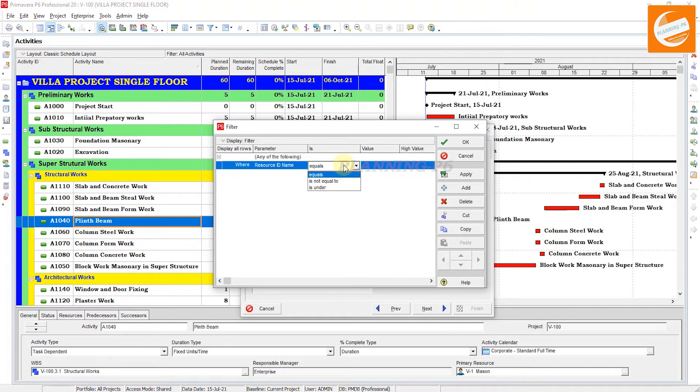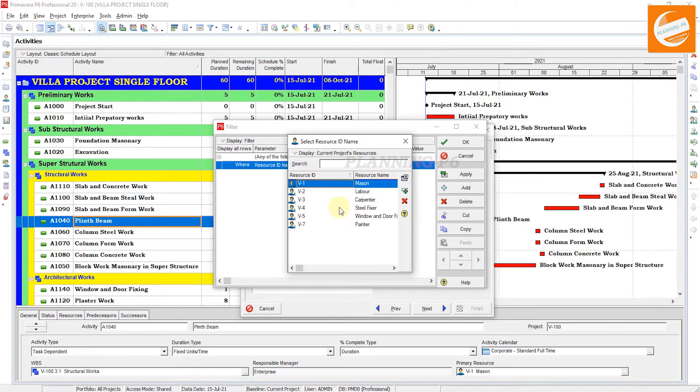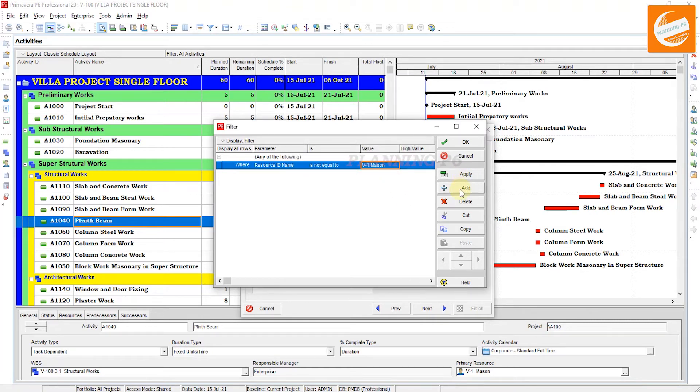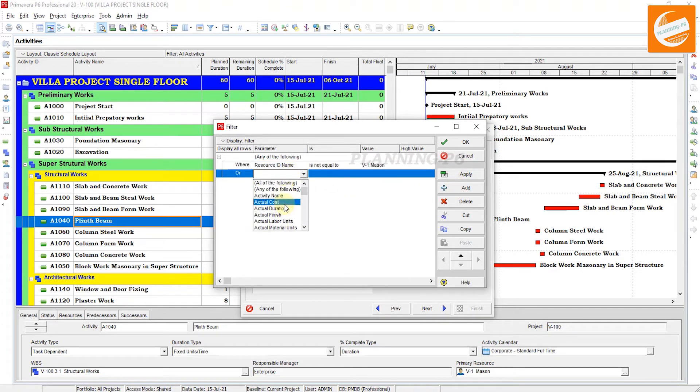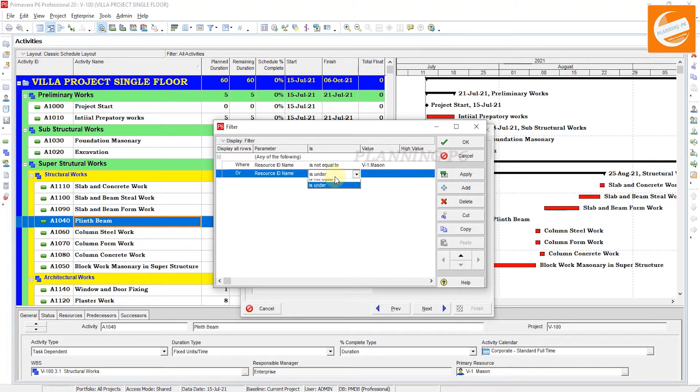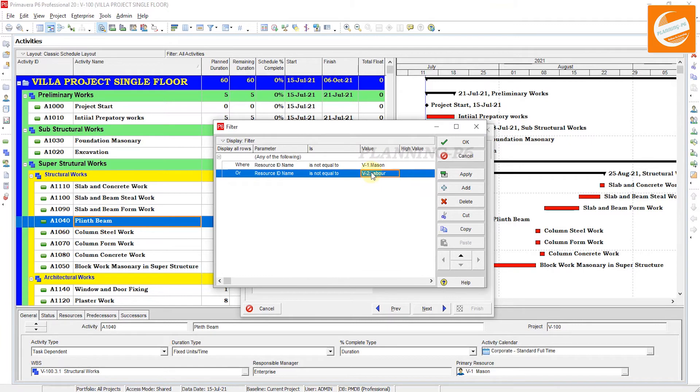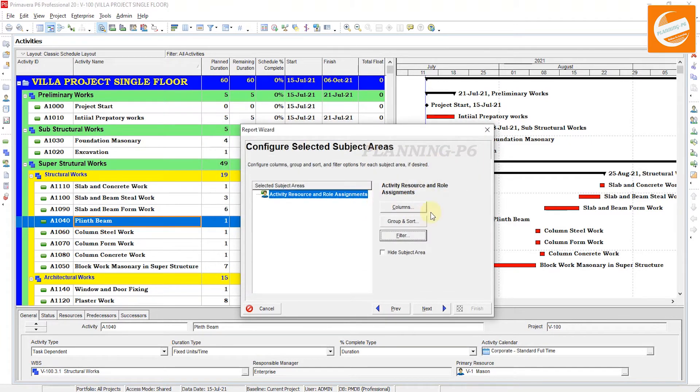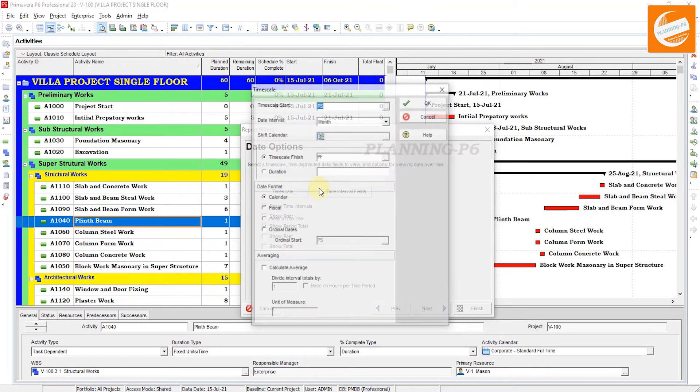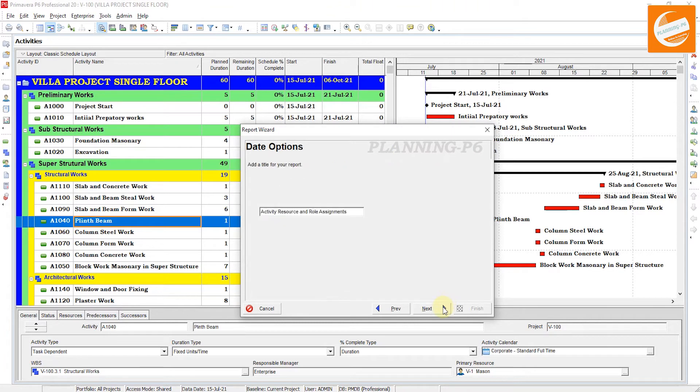Create one major resource for the quantity and create one major resource for the cost. If you have created the major resource, then use Equals. If you have not created, then you can extract with 'is not equal to' these resources. Put these resources 'is not equal to' with the same method which you have done before. Resource ID Name is not equal to other resources. Then it will be whatever your quantity is assigned.